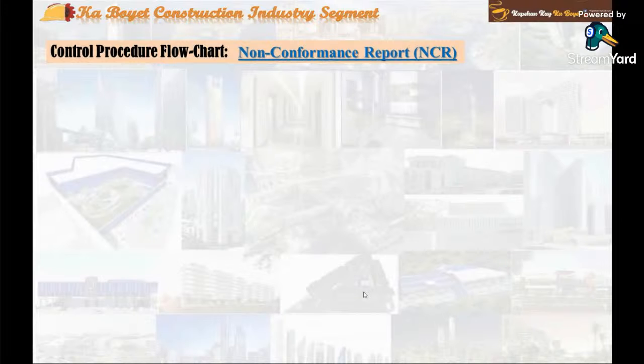A non-conformance report documents the details of a non-conformance identified by any concerned parties, like the owner, the project architect, engineer, the designer, the quantity surveyor consultant, the construction management consultant or construction supervision consultant, or the local authorities having jurisdiction of the project. The objective of the report is to make an unambiguous, defensible, clear, and concise definition of the problem so that corrective action can and will be initiated by the contractor.